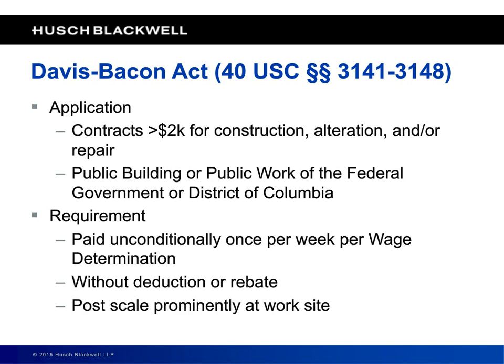Now I want to go back and talk a little bit about the application of the Act, because that can become interesting. But as a practical matter, you will know if your project is subject to the Davis-Bacon Act primarily because you should see contract clauses and a wage determination included in your contract that says, this is subject to the Davis-Bacon Act. Here's the wage determination that you have to pay workers according to. But before I get to that, let's look at exactly how the application language is worded in the Act, and then I'm going to talk about a recent case interpreting that language.